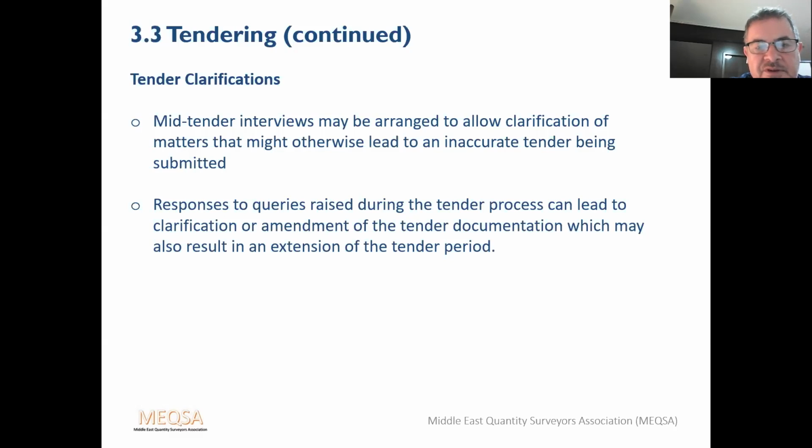The responses to queries raised during the tender process can lead to clarification or amendment of the tender documentation, which may also result in extension of the tender period. Now, it's very common for the tender period to be extended. Usually in practice a time is set for the tendering.